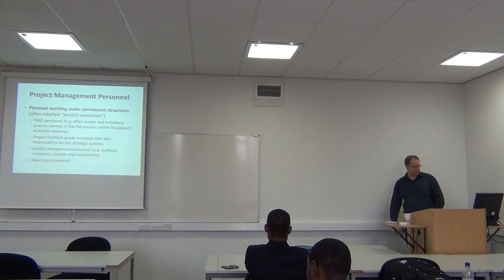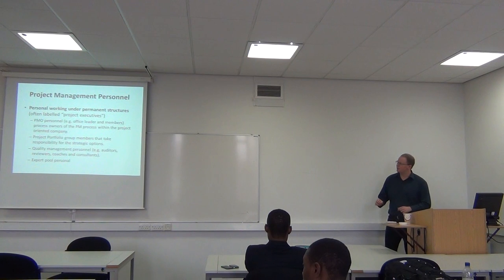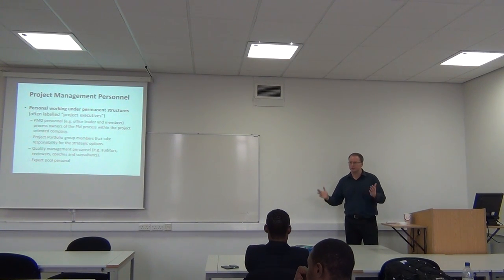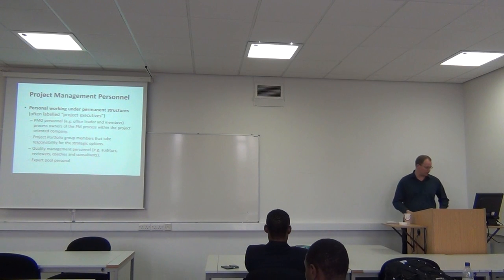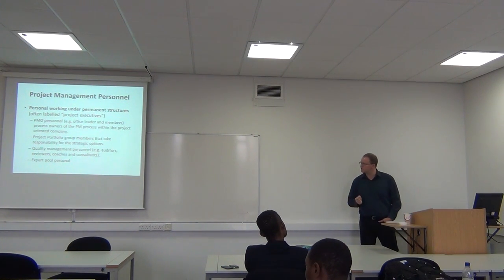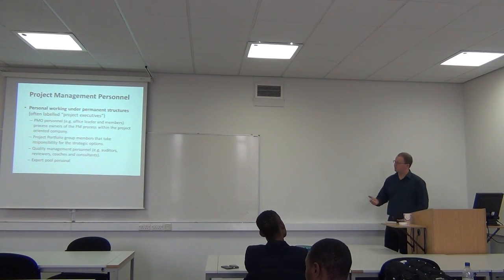Yeah. And then aside of that, they really focus on the quality and the enabling of the project process. So quality project process sits with those guys. And then you have, of course, quality management, which focuses often on the product quality. So those are the two dividing forces, if you want. So if you have particular materials that need particular quality standards, or products or particular services that are required, this often sits with the quality management personnel. And here you find auditors, reviewers, coaches, consultants, often brought in if you don't have them yourself.